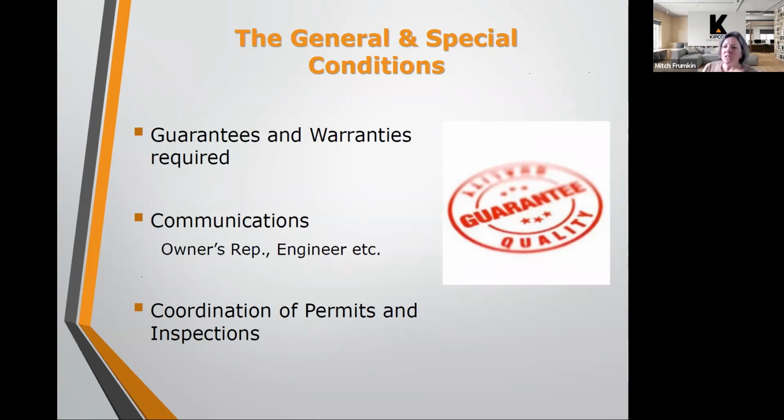Okay, now one more question. Are there standardized specs for routine or frequent projects such as concrete replacement, painting, and catch basins? That's an excellent question. Actually, yes, there are general specs that can be prepared. If it's a repetitive type of project where what you are remediating or replacing is very much the same, a general specification can be prepared for use whenever you need to do that type of replacement. Absolutely, that can be done. If it's something unique to that site, then no, it's not.